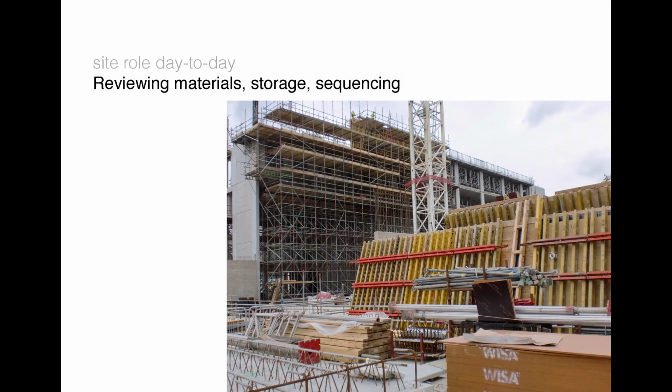So walking around site, I mean, you've probably seen from the university, there's an awful lot of false work and an awful lot of building that goes on in order to build the building. So all of the scaffolding, which is erected and goes up and down, all of the propping and everything, but we don't get involved in that at all. That's down to the contractor of how they build it. We've got a duty as designers to make sure it can be safely built, but how they actually choose to do it is up to them.